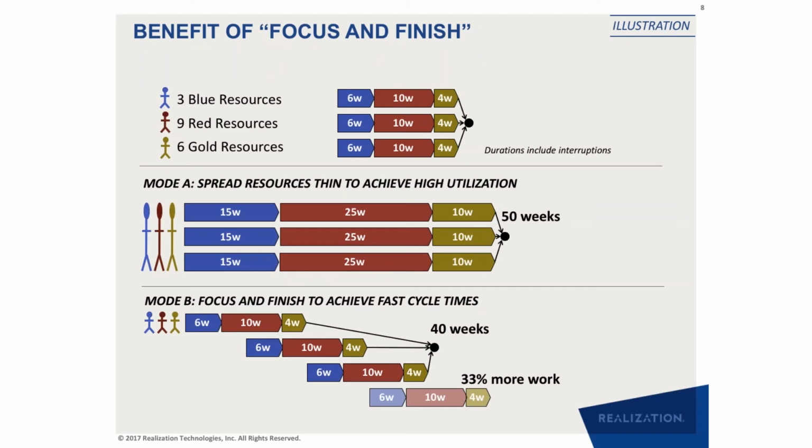So the logic you should still use to resolve resource contention in a project at the planning time is the staggering logic. Right? So in this particular case, all these three legs could be part of one project instead of being three different projects. Right? So staggering is the way to handle resource contentions, not a detailed task by task schedule.